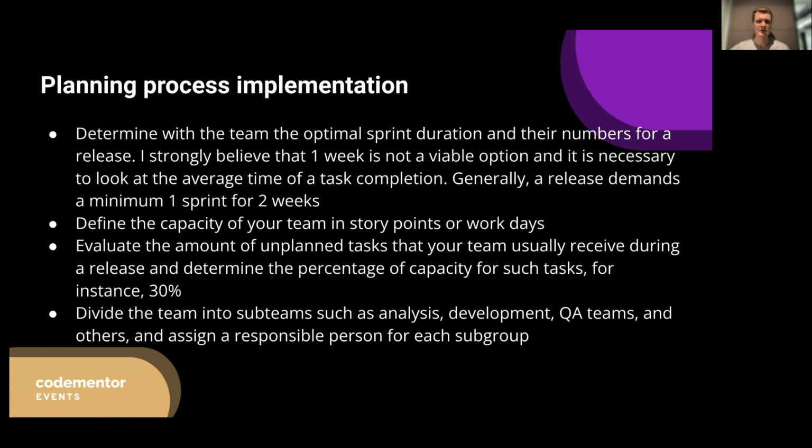Evaluate the amount of unplanned tasks that your team usually receives during a release, and use this as reserve time. Basically, you need to ask them how much time they spend on unplanned tasks, and this number could be and shall be adjusted in future, but you may start with something big, for example, 30%. With time, it will be more clear for everyone how much time is really spent on this kind of unplanned tasks, with the help of time logging, and with the help of creating tasks that took focus from the team. I mean, to create tasks and include them into the sprint.